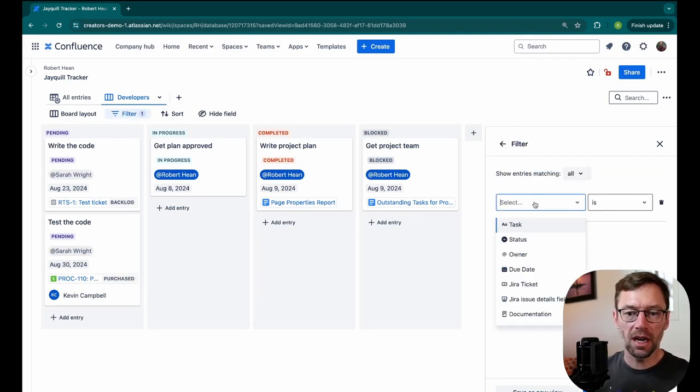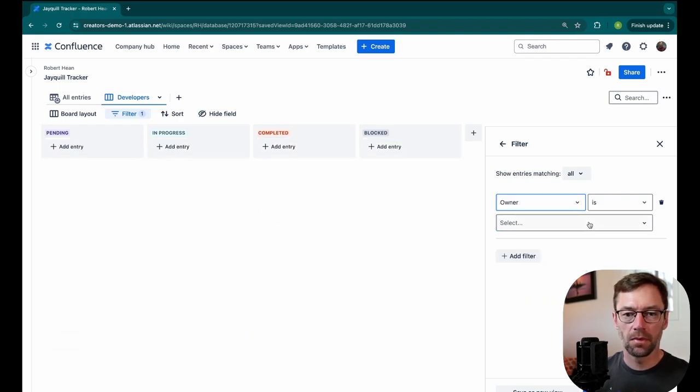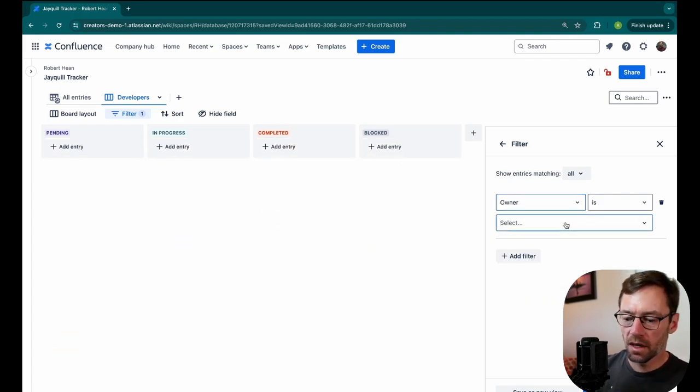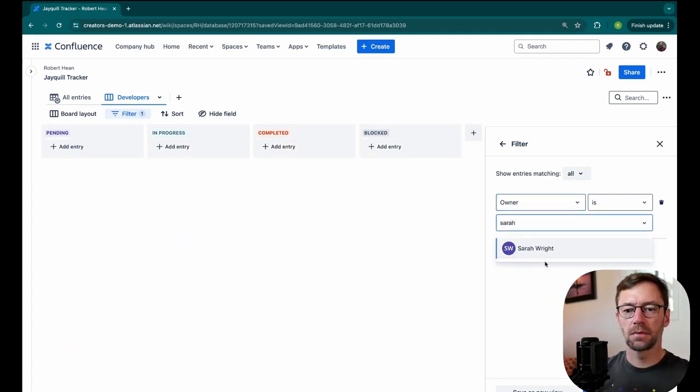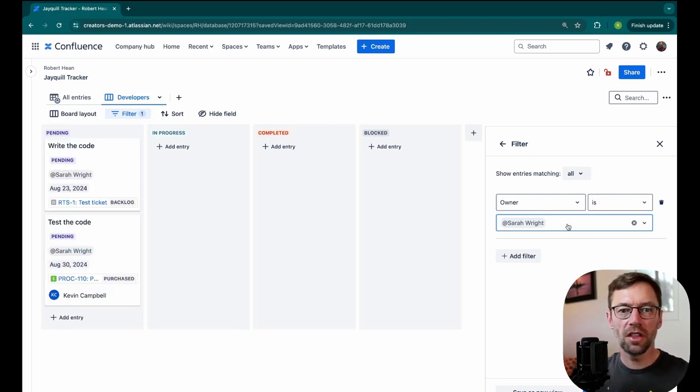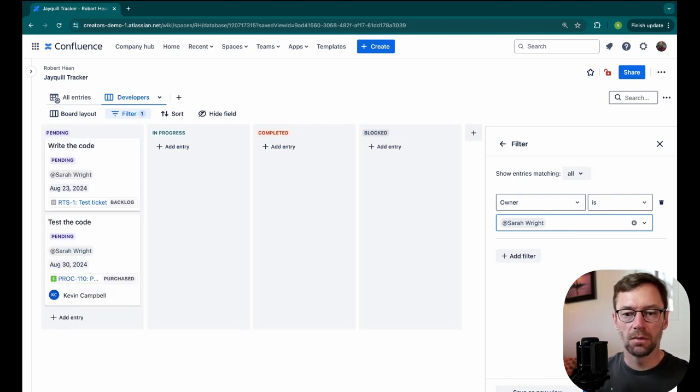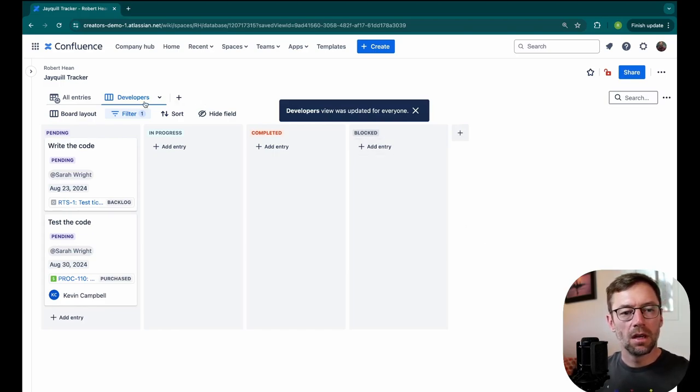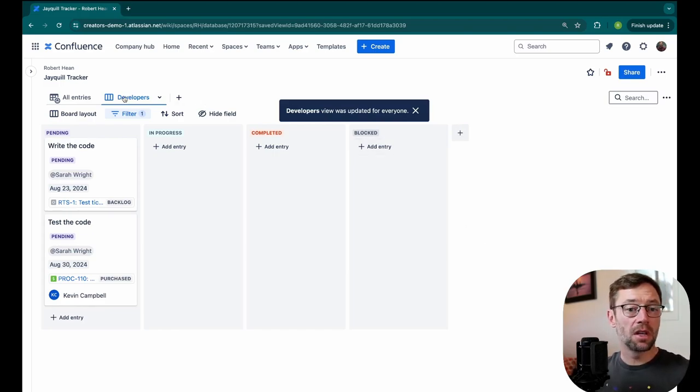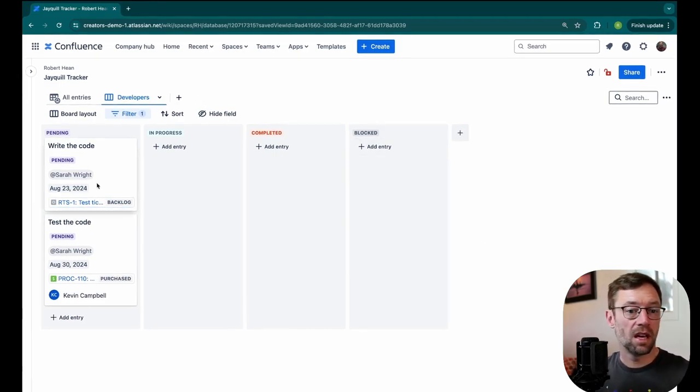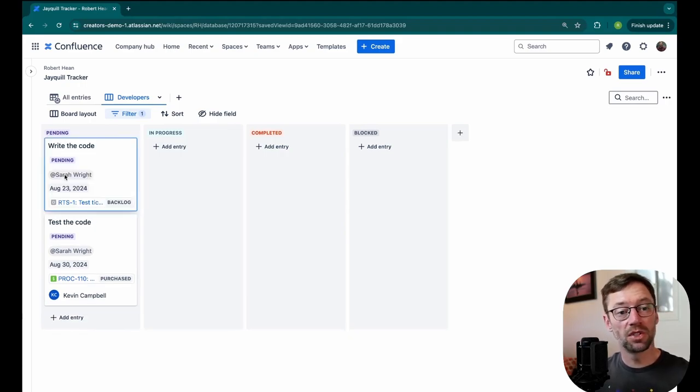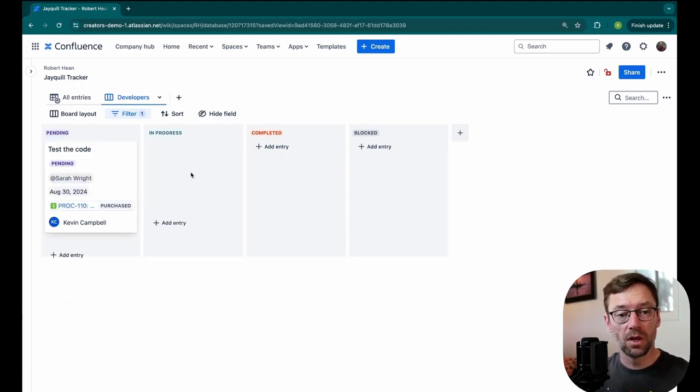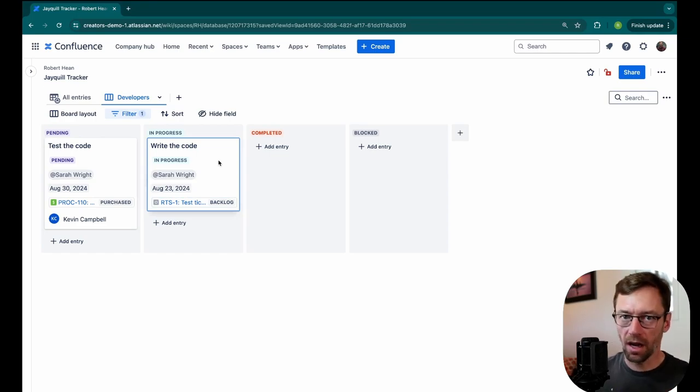The filter I'm going to do is filter on the Owner field. I'll type in Sarah. Here we can see just the things that Sarah is responsible for. So I'll update this view. Now Sarah can come in here and click on Developers and only see the things that have her name in it. I could do this on any field. This board view allows folks to drag it left to right, just like we would on a Kanban board in JIRA.